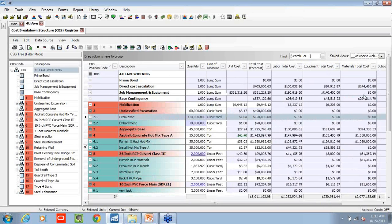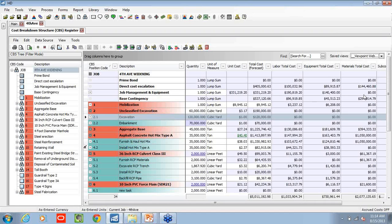Perhaps once I have my production set, I want to see my cost breakdown between my major categories. And typically major categories are labor, material, equipment, and subcontract. So by quickly switching my view, I can still see my quantities, my total cost.